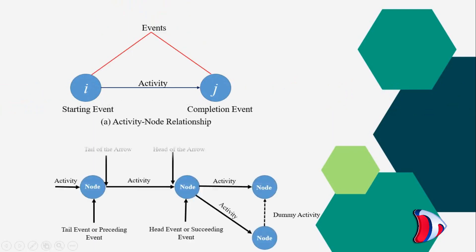Let us understand the activity node relationship. In network diagram, arrows represent activities and circles the events. The length of an arrow is of no significance. Each activity should be represented only by one arrow and must start and end in a circle called event.